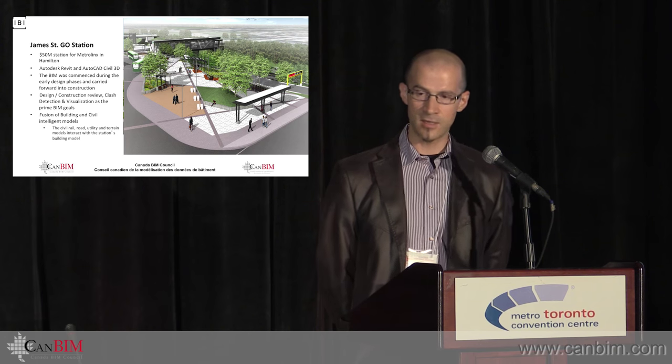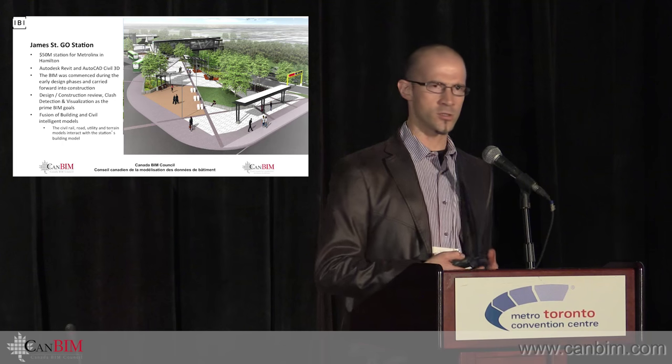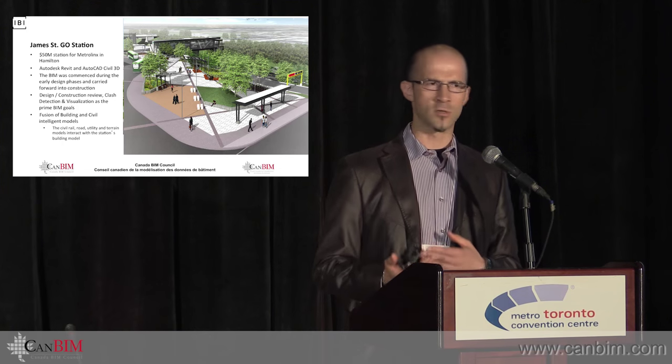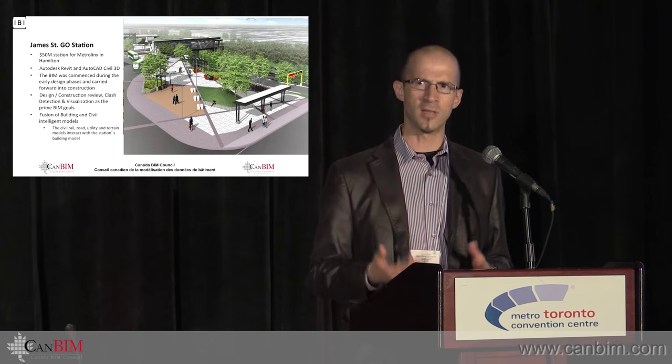But with that said, it'll identify some good ones. So if I want to do a clash of a structural model against a structural model, probably not a good idea, because I don't want to know where columns are sitting on beams and where beams are sitting on footings, because that's probably all as designed.